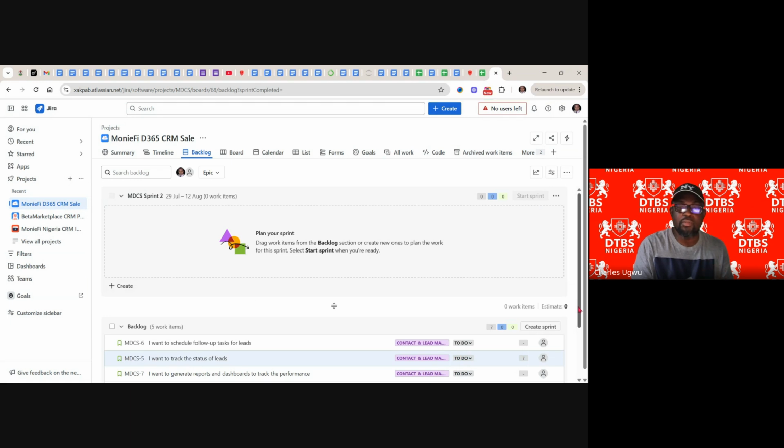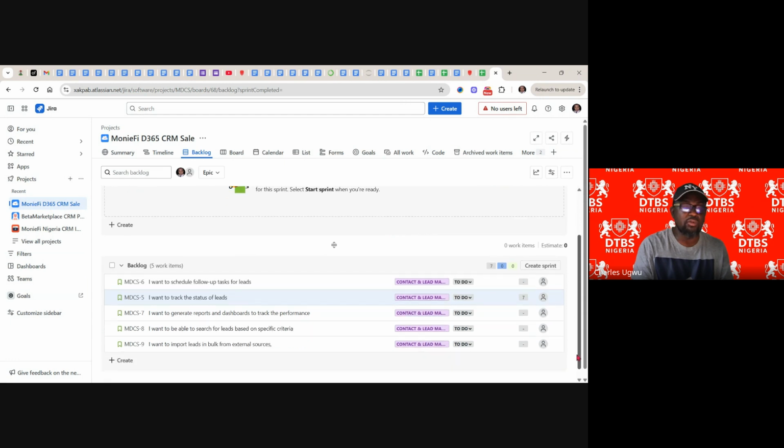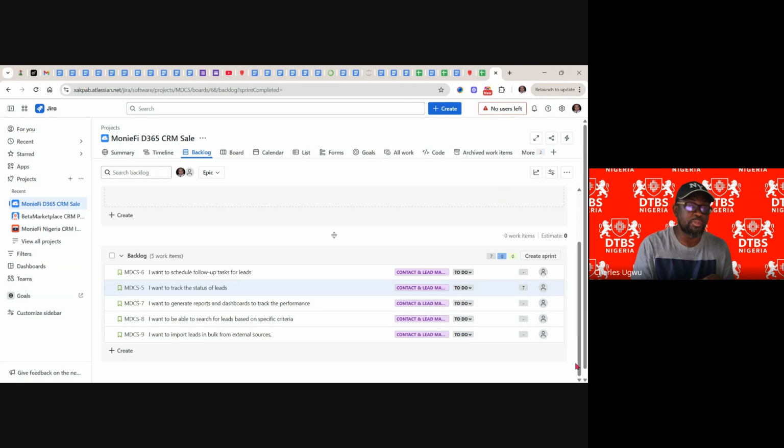Before we complete anyway, we must have what we call sprint review, where we invite stakeholders to demo our work. And after that, we equally have what we call a sprint retrospective meeting, when the team will come together for lessons learned, to see what they've done, what they could have done better, where they would need to improve on.